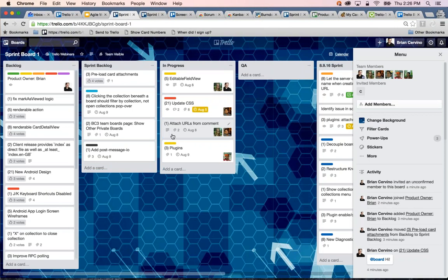The reason for a nonlinear numbering system like the Fibonacci sequence is because time estimates or difficulty estimates are very hard to make. And the bigger the task, the more uncertainty revolves around that task. So by using a nonlinear numbering system, it recognizes the difficulty of a task without producing a false level of confidence for the specific level of difficulty. So anyway, I'm going to share a useful Chrome extension in a moment that can help this process.